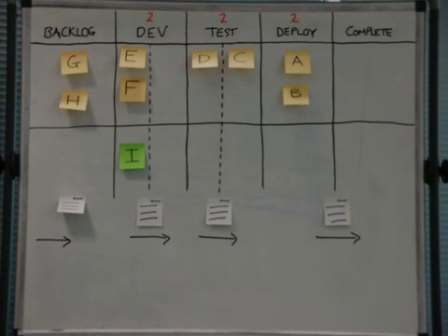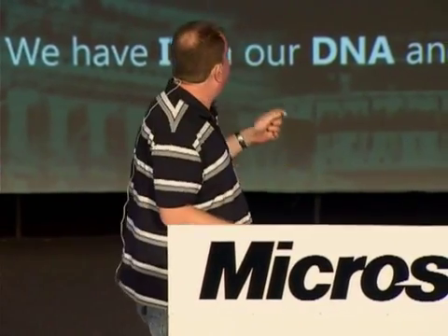Yeah, so we're getting advanced now. I wish I brought some photos up of more advanced Kanban boards, but for parallel work. A classic example of parallel work is where you've got a developer and a designer working at the same time on something. The way that I've seen it done is you effectively have the dev, by dev I mean develop and design in Blend or whatever, but they split into two horizontal lanes within progress and done, and they effectively loop back in. The cards loop back in until they're both done, and then they go to a separate output queue.